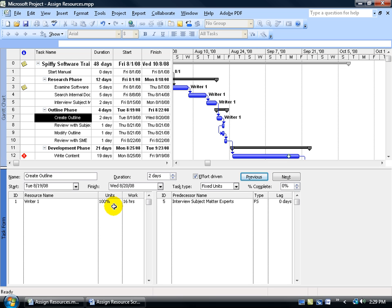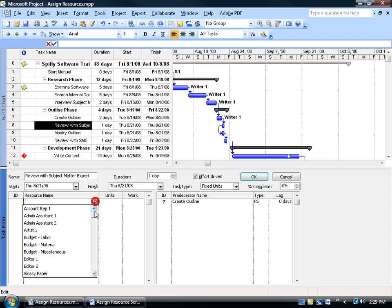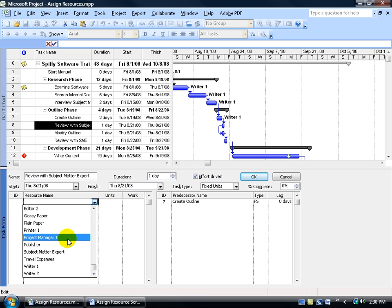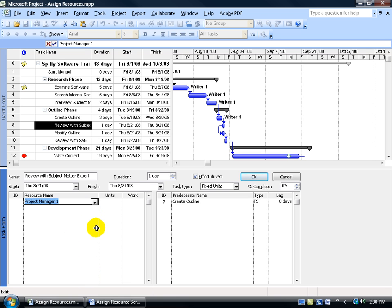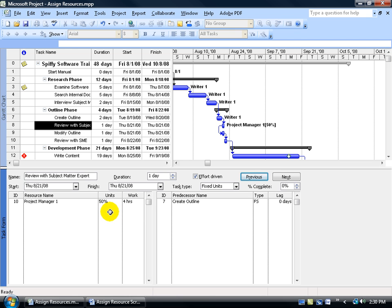Okay, let's say that somebody's not going to be working full 100% here. Let's go to the next Task 8 and say that, let me click in the blank area down below, and let's choose our Project Manager here and say, instead of working 100%, we can either come over here and click in the Units field and go down to 50%, and then click OK or click OK and then make the change. Either way, what we're saying here is when you're working at 50%, you're working at half. In other words, not a full 8 hour day. So the Project Manager is going to be assigned to review with subject matter experts but only for 4 hours. He's not going to be totally locked up on this one task.